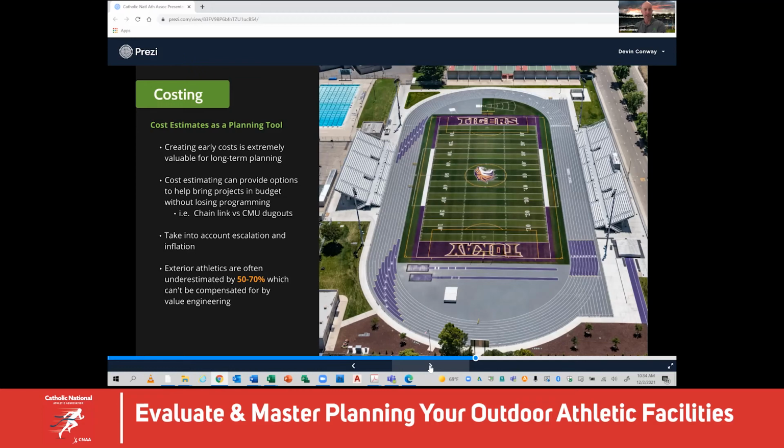So it's just important to understand that if you get inaccurate ROM numbers, rough order of magnitude budget numbers, from a master plan, and you are planning for that, when you get your bids 6 months down the line from the builder, you may be rather disappointed with your end product from the master plan. You need to make sure whoever's doing that really has a good sense of what things cost and that they have delivered these kinds of projects. They're not just planners, but they have actually had them built, and they've worked with builders who are specialized in this type of work. That's really important.